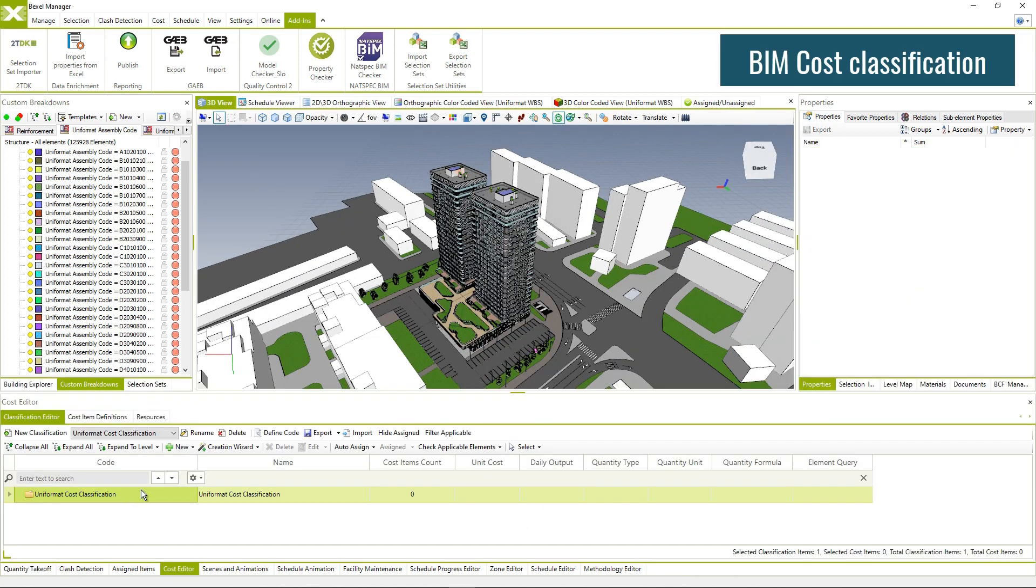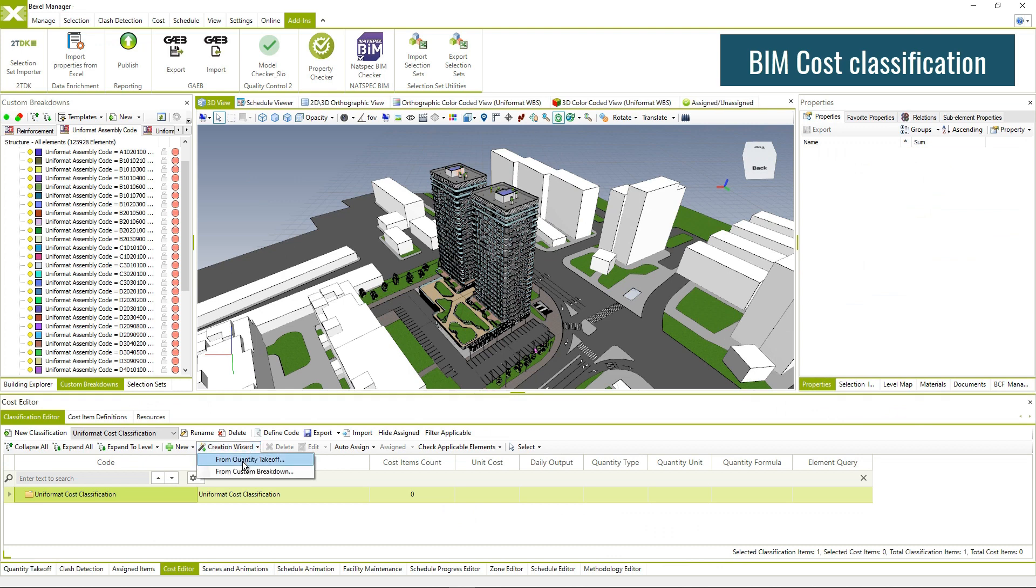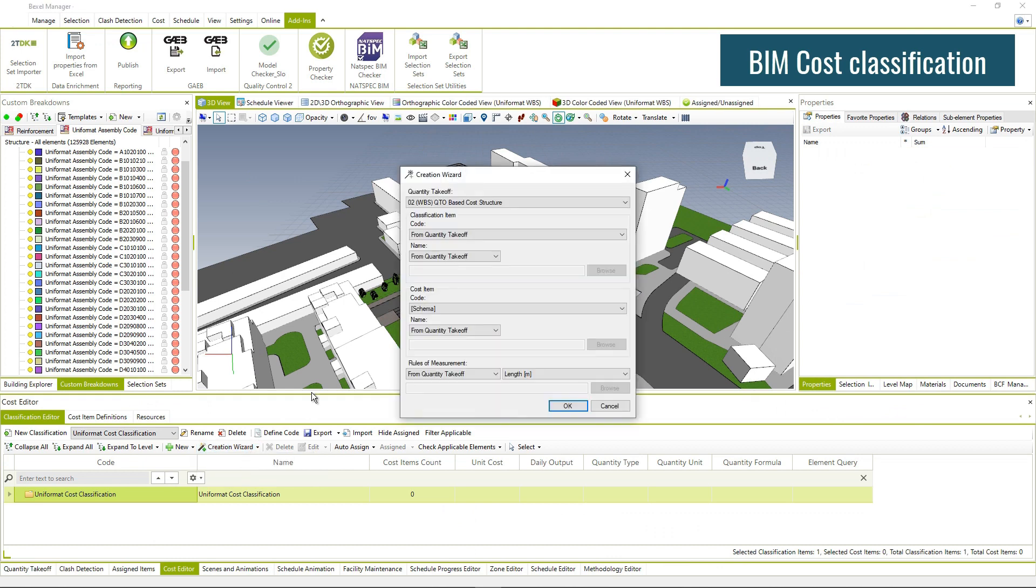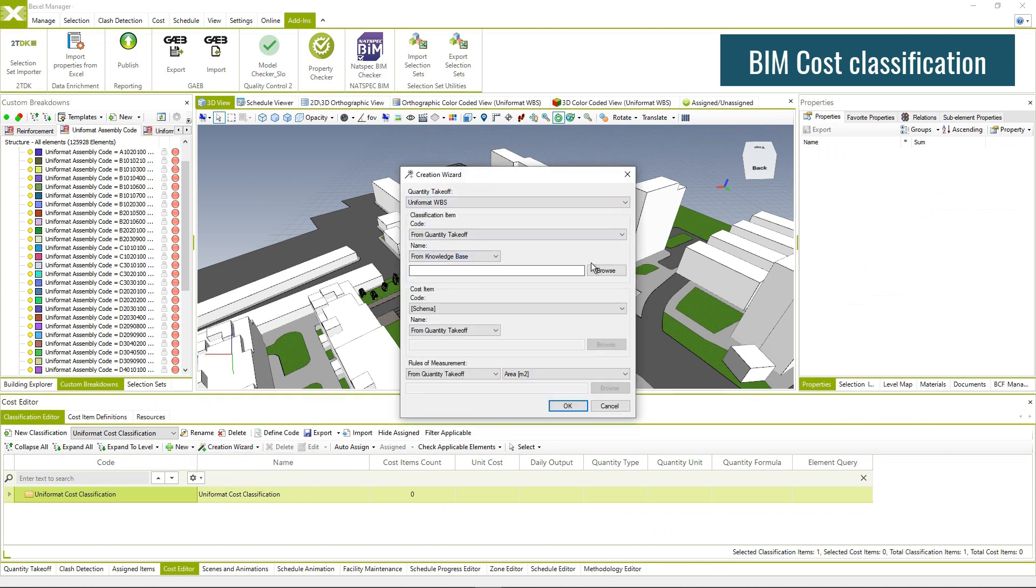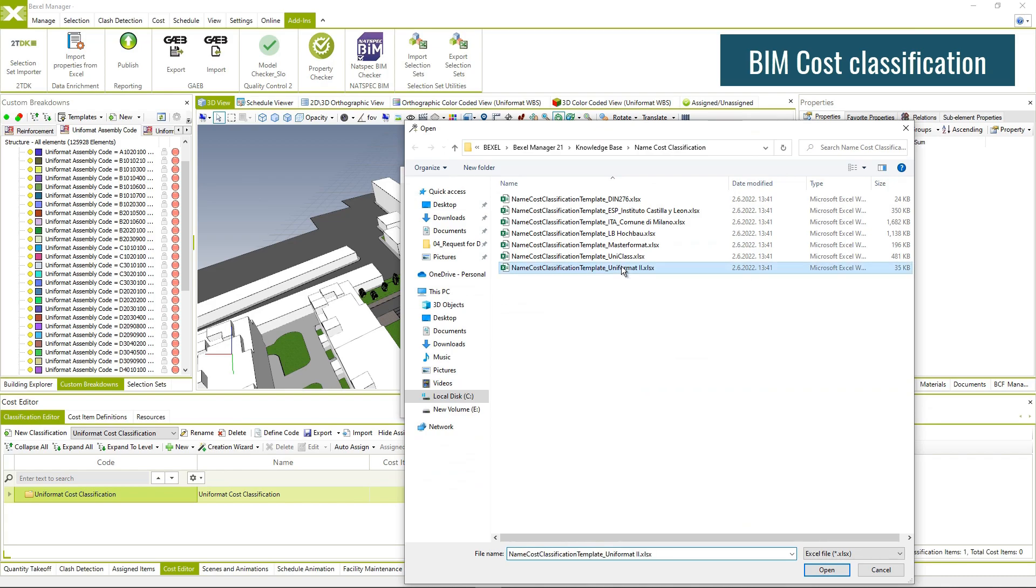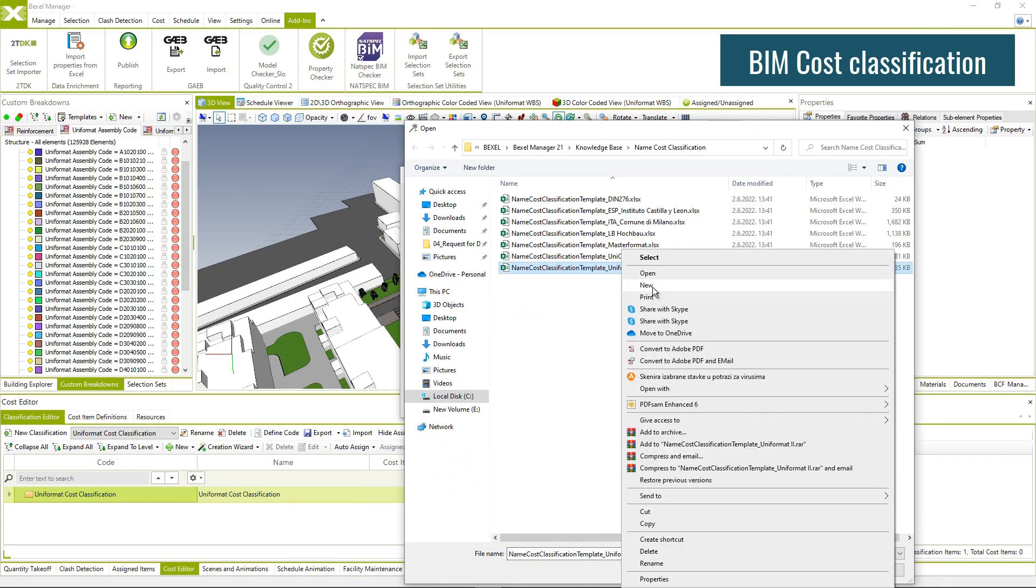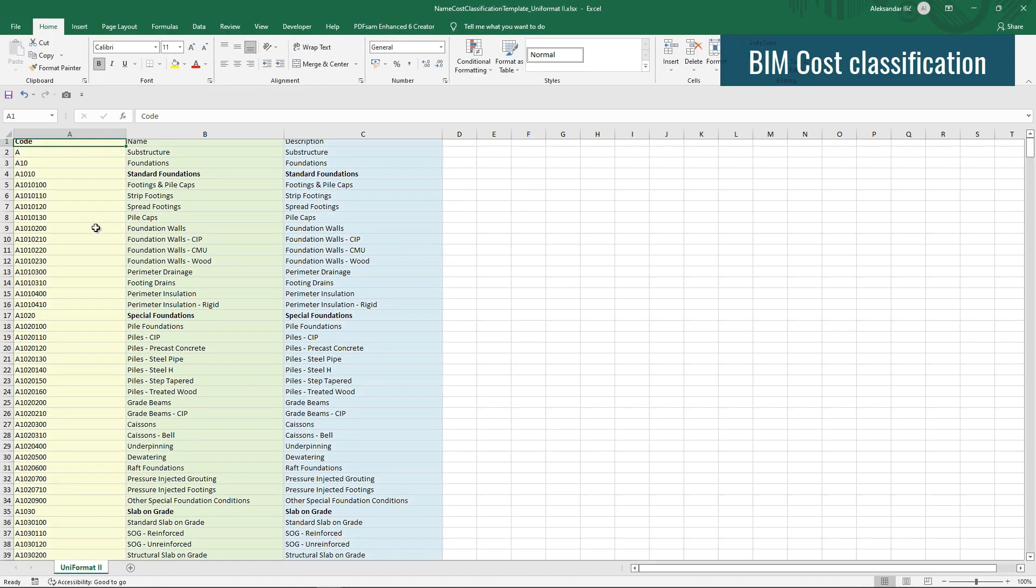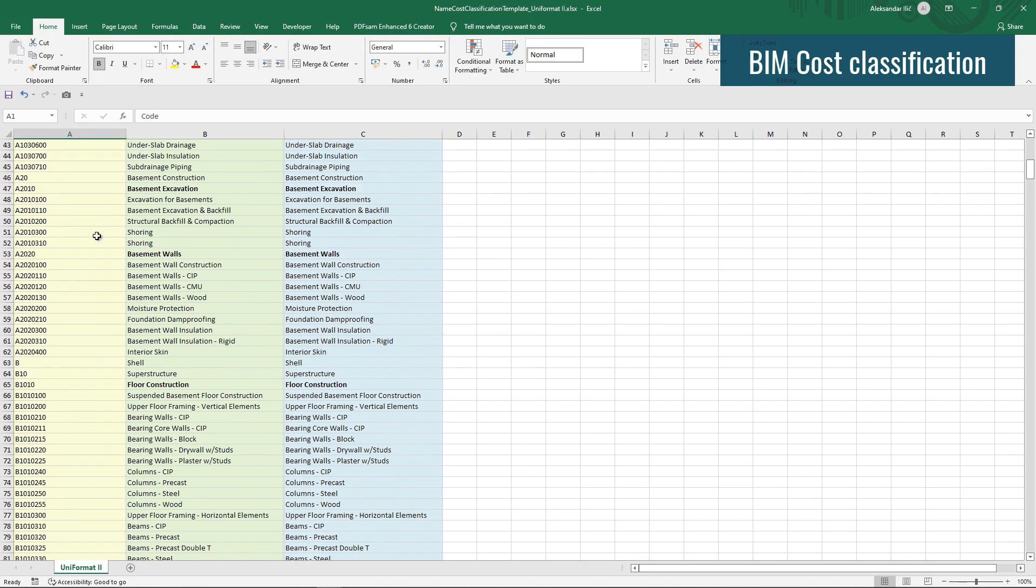Generate cost classification with defined element queries using quantity takeoff breakdown structure and use templates based on standardized cost classification codes to automatically enrich classification.